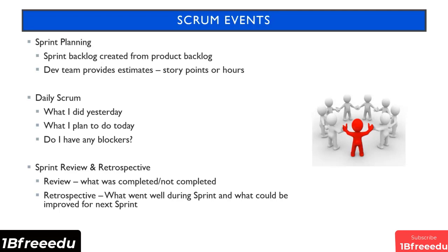So once the sprint planning meeting is complete and the sprint starts, a daily 15-minute Scrum meeting is held with all the members of the team and mainly facilitated by the Scrum Master. This meeting is always limited to 15 minutes, or at least should be limited to 15 minutes, so the team members usually stand up while doing it to ensure that it doesn't go any longer. During this meeting, every team member gets a turn to talk about what the person did yesterday, what the plans are for today, and if there are any blockers. Now, if there are blockers, this is where the Scrum Master can step in and work with that team member to get things unblocked and moving again.